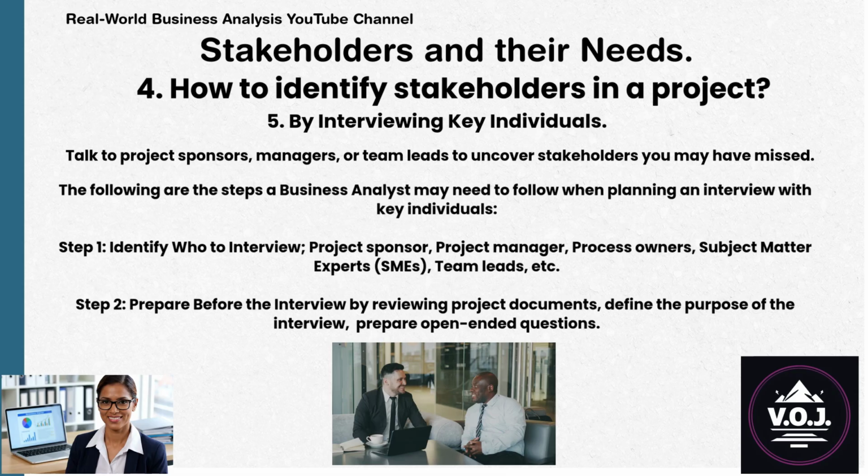Five. By interviewing key individuals. Talk to project sponsors, managers, or team leads to uncover stakeholders you may have missed. The following are the steps a business analyst may need to follow when planning an interview with key individuals. Step 1. Identify who to interview. Project sponsor. Project manager. Process owners. Subject matter experts, SMEs. Team leads, etc.